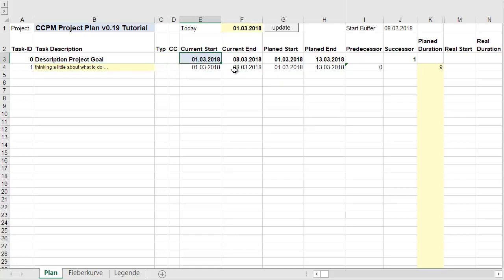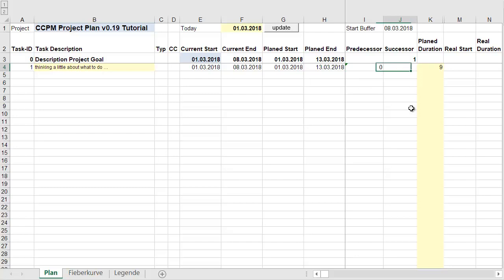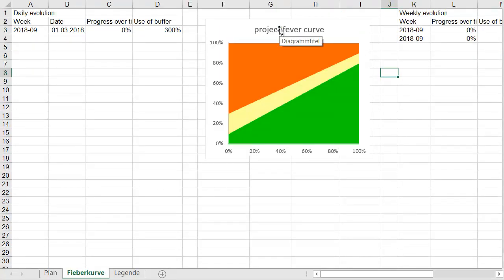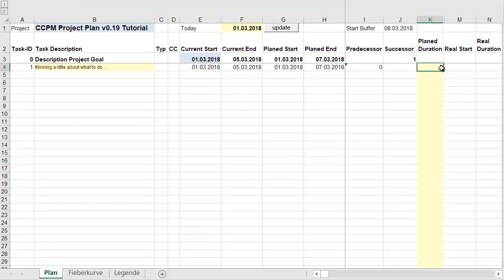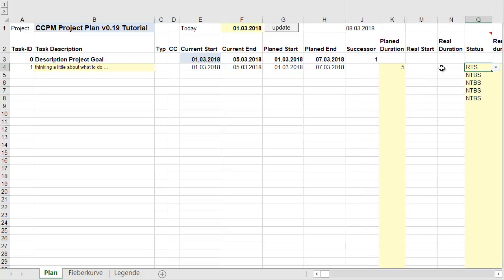This is the start date of the project. You have to define a predecessor — in this case task zero, the start of the project. I've entered a planned duration; I'll reduce it to five days. You can push the Update button and a Gantt chart is designed. You'll also see a project fever curve, but it's empty because we're still in planning mode.